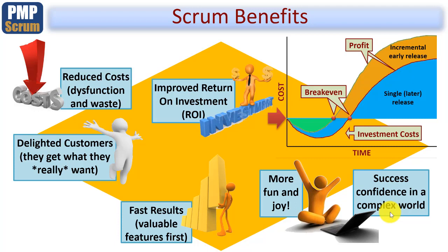Take, for example, a project which is to build a new office block in a city centre. The construction industry has been around for a long time, a lot longer than creating software or IT projects, and using the waterfall or prescriptive approach is the best way of delivering such projects. For example, you wouldn't want a Scrum team on the 53rd floor deciding to redesign the basement when you're already working on floor 10, if you see my point.